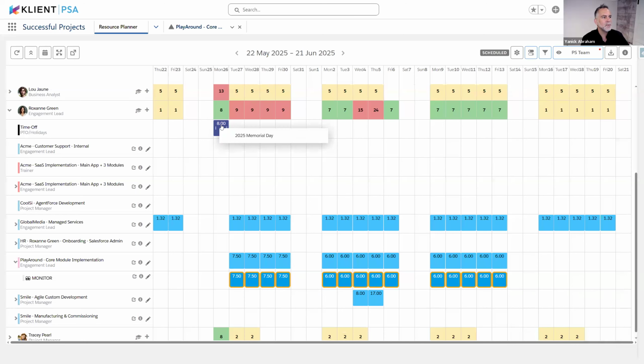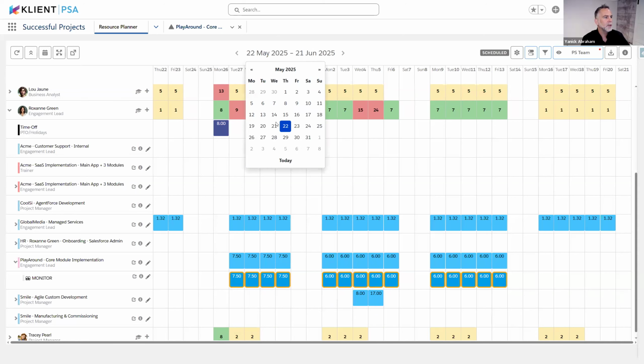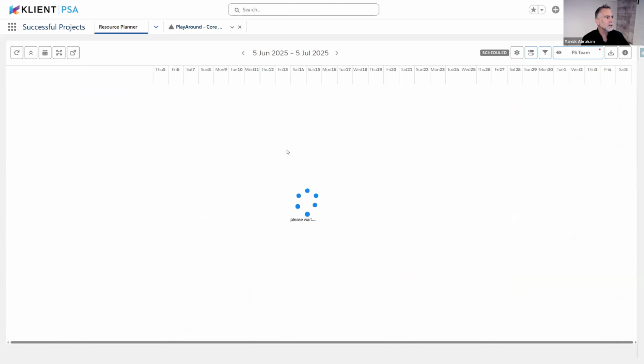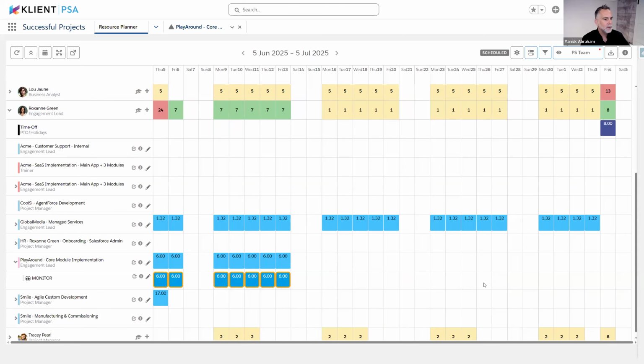But because I said respect holiday, and Memorial Day is next Monday, it skipped Monday, but it increased the number of hours to total 30 hours on the following days. So this is the logic for this. And again, if I say, okay, I'm going to start with this, and then for the next month, we're going to be doing only this week here.